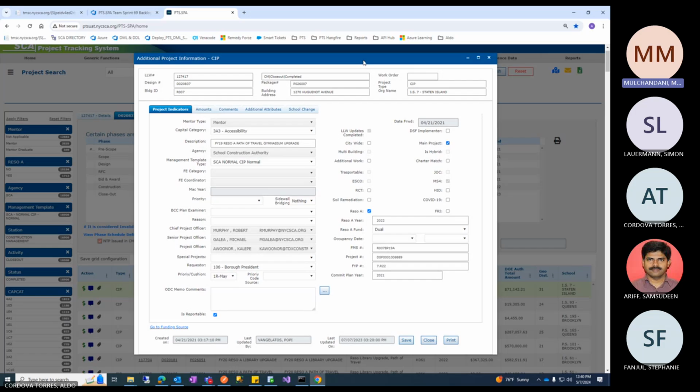There's a difference between completed and ready to forward. Basically, the project controls department only does this task or activity, and they are done. So now the next step would be done by another department. When there's another department involved in the movement of a schedule or task, a forwarding is done. Basically it's forwarded to the other department. So at this point, once they mark LLW completed, it's complete for project controls and ready to forward, so that they can forward it to the next department, which is A&E, because scope and design are two activities which are done by A&E.